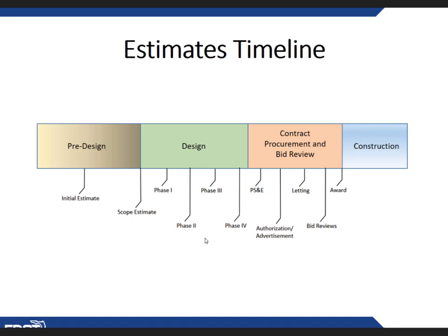Hi, this is Missy. I'm going to jump in every now and then and emphasize some of the things that Diane just mentioned. And again, she covered the scope. Be very clear when you're talking to somebody about the scope. Are you talking about the consultant designer scope of services, or are you talking about the construction scope and what will be included in the plans for letting an award later down the road? So two different uses for the term scope. So always make sure that somebody understands which scope you're talking about.